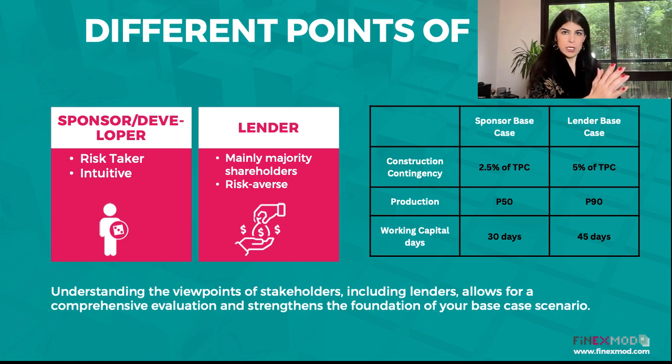They say, okay, no matter what you think, based on our experience, we would rather have 10% contingency included in the budget. So sponsors take that 10%, put it in their model, do all their calculation, and when they want to look at the scenario from their point of view, they would test: what happens if we do not spend all the 10% contingency and we only spend 5%? And depending on the way that the contracts are drafted, they will see how they can manage that unspent contingency.